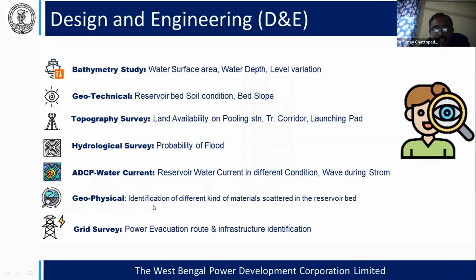geophysical survey you have to study, and the grid, what is in during the power evacuation time, what route you have to follow. This route should also be finalized before execution of the project.